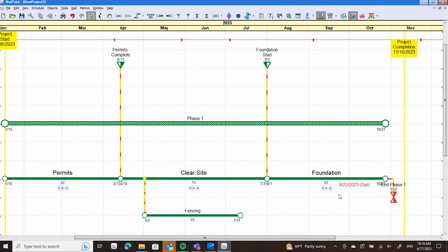Now, something kind of funny happened here. We used to have 9 days of float, and then all of a sudden we have 4 days of float. And the reason is because a benchmark is terminal to float. And this is a great way if you're going to have multiple phases in a project. If you tie off the end of each phase to a benchmark, then you can conserve the float for later phases. You can apportion float across the project, which can be very helpful.